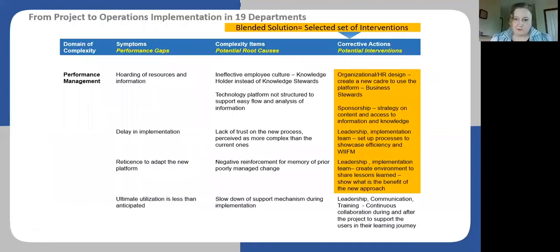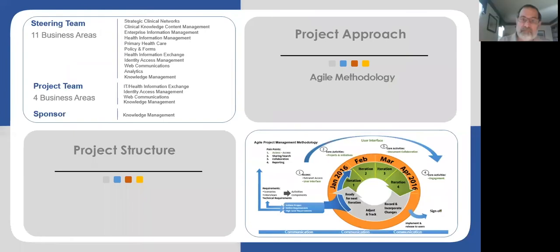Correct. So I'm going back to that one. Yes, exactly. So it was a minimum viable product every time we had an iteration. So we had the frame of what we wanted to do. So we responded to the user needs from, this is how the interface should look like. But they were active only the buttons that were leading you for that particular topic.